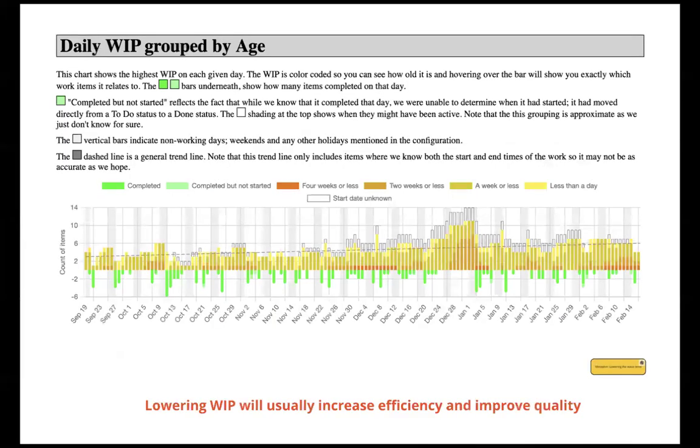All right, so now let's take a look at work in progress. It's one of the four main flow metrics that we talked about. These are items that have started but have not yet finished. We can see a number of things for this team. We're looking at aging work. So we can see that items in gray at the top, I don't actually see any grays, but if there were anything up here, sorry, up in the brightest of yellows, they just came in today. I'm not worried about stuff that just arrived today.